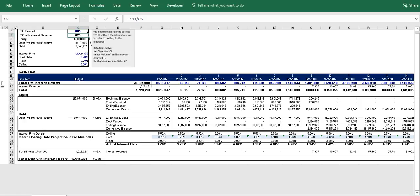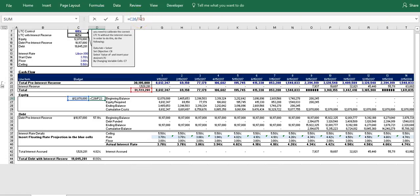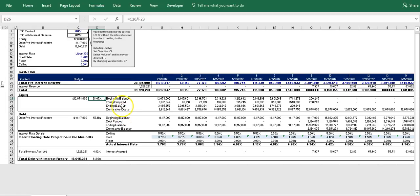So we have this set appropriately and what we need to realize is that the debt will always be responsible for the interest reserve portion of the budget. And so currently the debt is covering its 60% share of the cost pre-interest reserve plus all of the interest reserve.